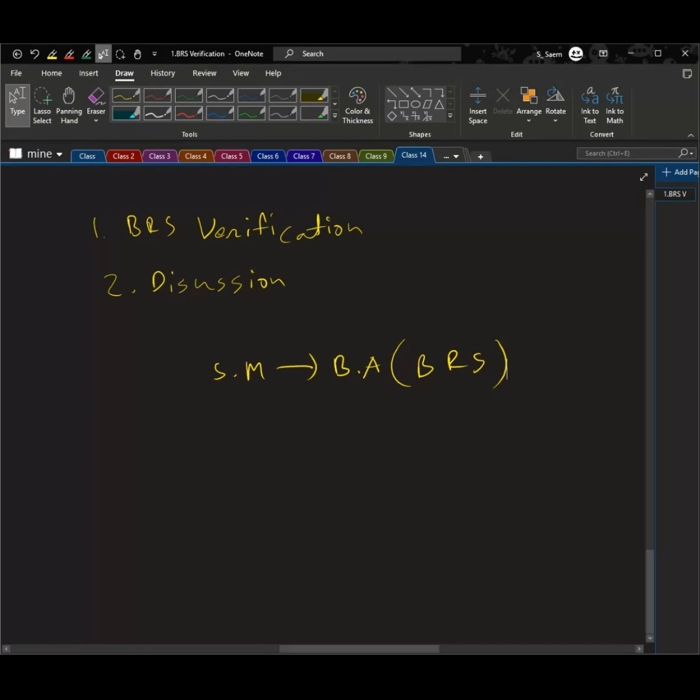Okay. After the pre-refinement session, but before the refinement session, developers and testers work collaboratively to estimate the effort required for completing user stories. So they don't assign stories to individuals at this stage. The focus is on calculating the effort for the story as a team.